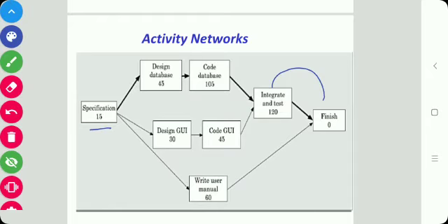The manager can estimate the time duration for the different tasks in several ways. One possible way is to assign durations to the different tasks by experience. The second way is to let each engineer estimate the time for the activity that is assigned to him. This means if there is a requirements engineer, then he has to tell the duration for the specification. If there is a code developer, then he has to tell the time for the coding.